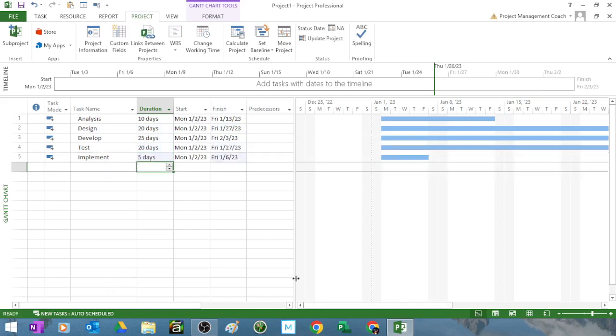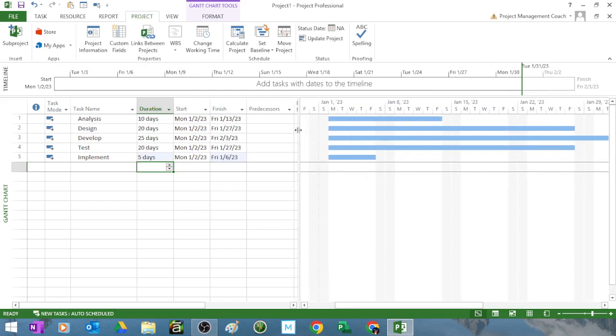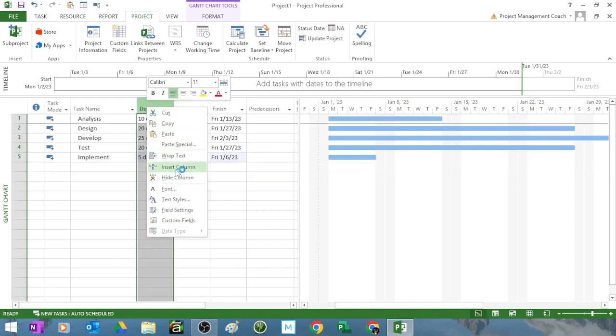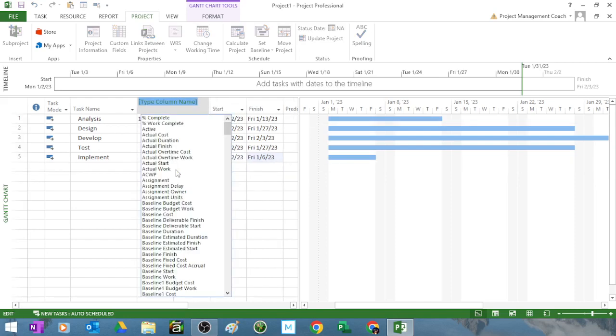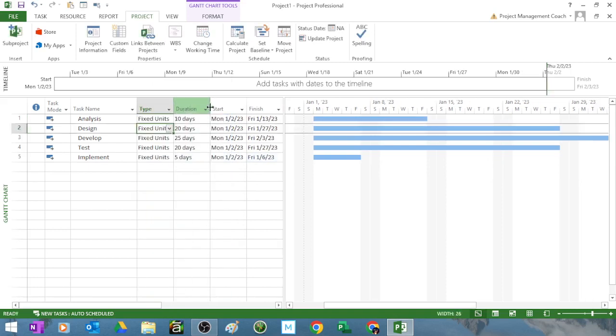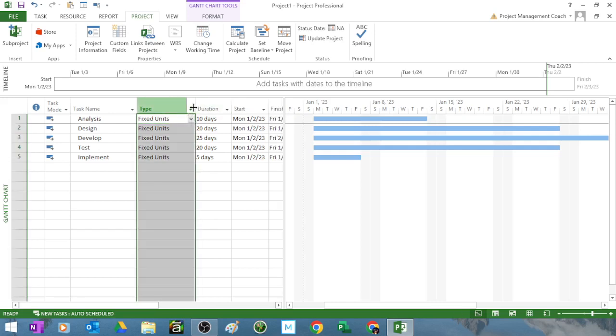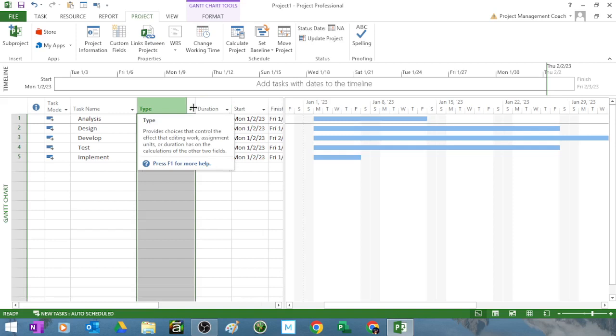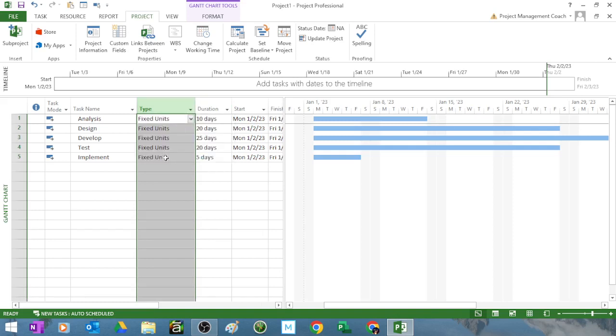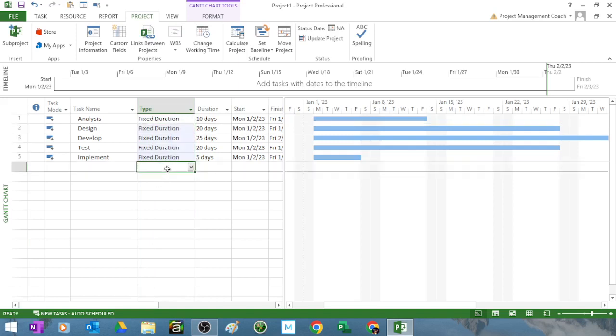And these are durations for the tasks. And the next thing you do, depending on what exactly you are doing, is decide on the type of task. Now what makes people run all over the place with Microsoft Project is this one field. Let's insert the column and let's put in type. When I do that you can see we have fixed units. However, putting fixed units here will make Microsoft Project use the calculation work equals duration times units to scramble around the duration. If you don't want the duration to move on you, you got to change this to fixed duration. And I'm just going to copy down and make them fixed duration.